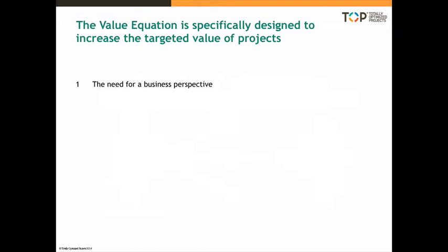But they don't define in clear, specific, measurable terms the new business as usual end states to be delivered, what we call desired business outcomes. This is not only a glaring gap insofar as many projects' definitions, but also a major contributor to the missing benefits and value. The first step in the value equation is to identify and define the business outcomes desired from the project investment. What do you actually want to achieve in business terms? For most projects, there are between 6 and 16 outcomes to be delivered. Programs obviously have a multiple of that, depending on the number of projects involved.